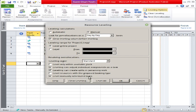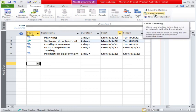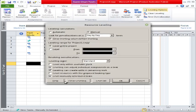Going back to the Resource tab and the labeling option: 'Level manually scheduled tasks' lets you choose to level or not level manually scheduled tasks. 'Clear labeling' means the tasks which are already leveled — you want to clear that leveling. 'Level all' means all project tasks will be leveled. These options are available here and you can use them as well.